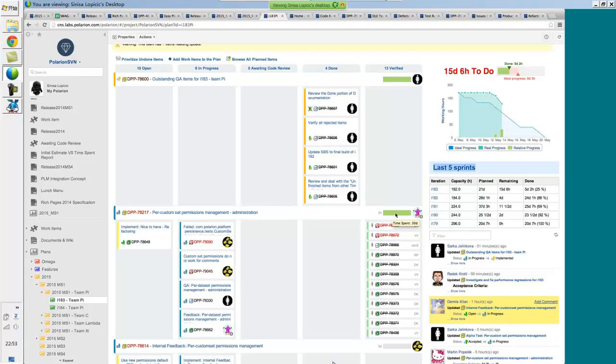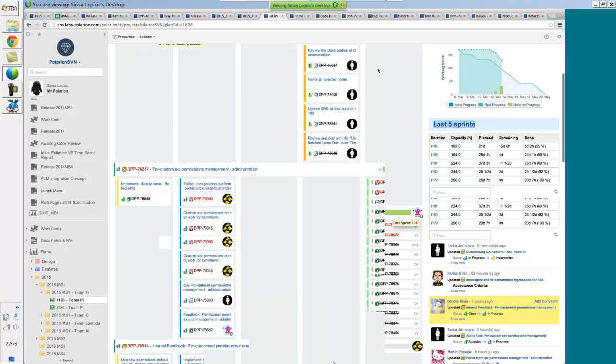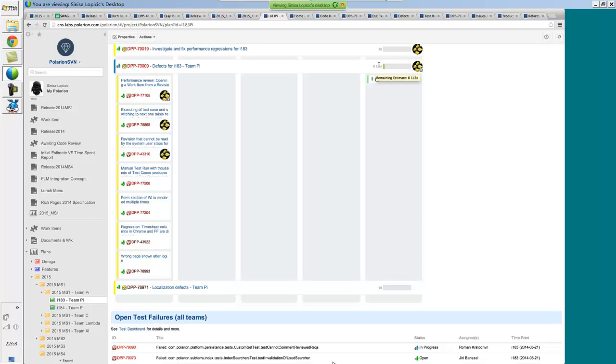And we have a defect backlog, which I'll show you a bit later with other backlogs, and we pop from there from the top and we plug it in here, and then we assign it. So for us, the defect is mainly based around time. We don't estimate individual defects. We estimate just the amount of time you're willing to spend on defects. So we set here a point of around 10 days, and this is what we'll be processing it through.